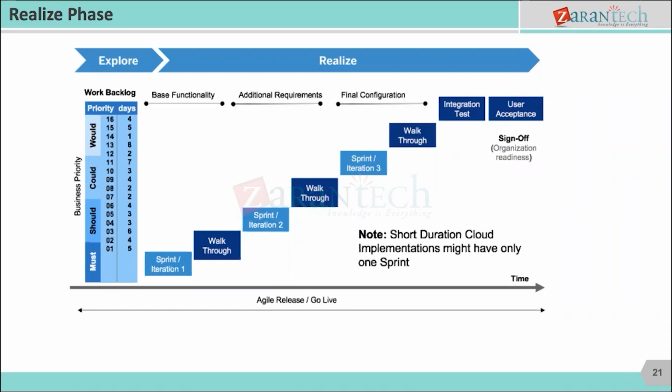And here also, for any changes, we'll take the feedback and again come back to the office and work for a few more weeks. Then on the 16th week, the final week, the final walkthrough. Now the system should be 100% configured, and you will be able to demonstrate any scenario end to end.